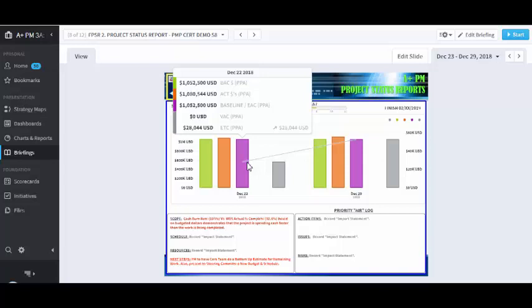So the project's either going to be put on hold, or the PMO governance is looking for a project that's performing well to see whether or not they can ascertain additional funds. Right? There have been no change requests applied to this project, because as you see, the budget at completion and the baseline / EAC are both the same.